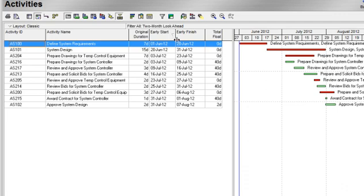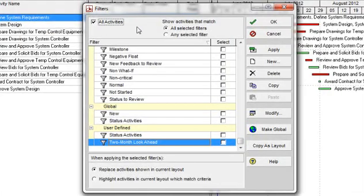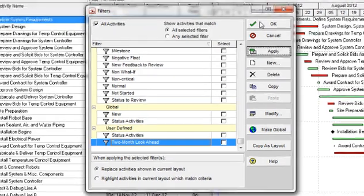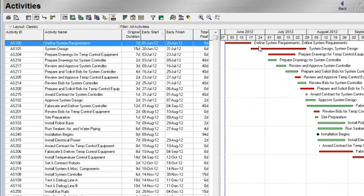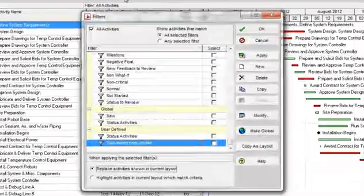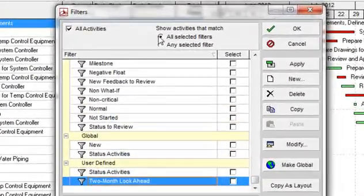Now go back and click on the filter button and refilter for All Activities. If we want to look at only activities that are critical and that start within the next two months, we can do it one of two ways: we can either use two filters in conjunction, or we can add a second parameter to a user-defined filter. The first method is to use two filters simultaneously by clicking on the filter button. We have a radio button that says Show Activities That Match All Selected Filters. By clicking this radio button, all parameters within all selected filters must be met.